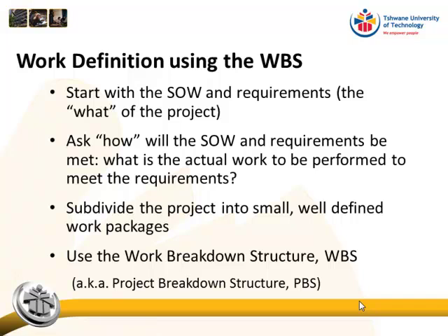The client or the stakeholders have requirements. Yes. It's not necessarily true that the project team doesn't have requirements, because the project team might also have requirements, but the project doesn't have requirements, the stakeholders have requirements. So you cannot put down the requirements of the project unless you know who the stakeholders are and what the stakeholders require from the project.